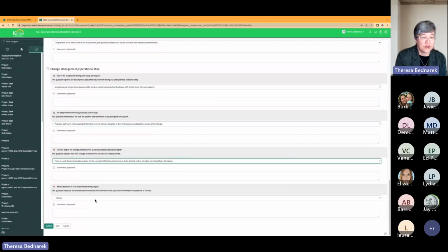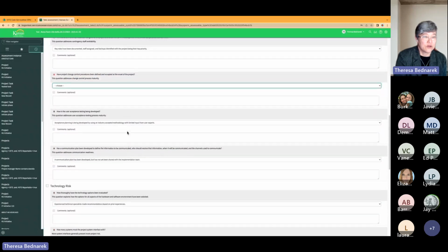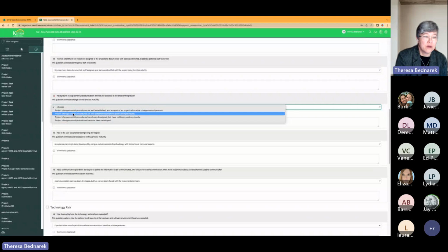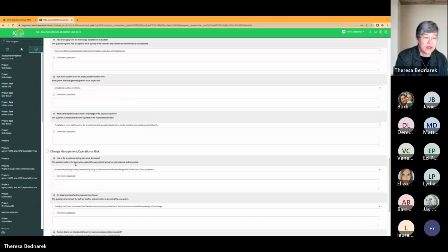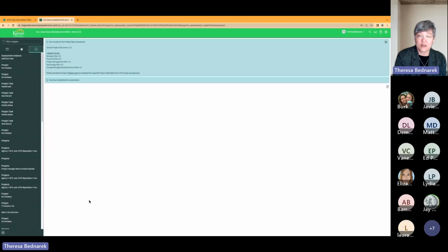And I'm close to the bottom. I'm going to submit. ServiceNow is going to prompt me to come back if I have one or more questions that I may have missed. I'm going to come here, answer the question, navigate to the submit button, and go ahead and submit my assessment. And once I've done that, you get an overall project risk score. You have some individual scores for each of the risk areas, and a validation that you have completed your assessment.